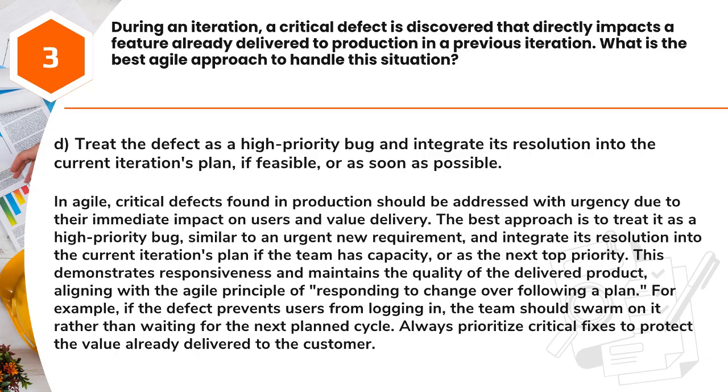This demonstrates responsiveness and maintains the quality of the delivered product, aligning with the Agile principle of responding to change over following a plan. For example, if the defect prevents users from logging in, the team should swarm on it rather than waiting for the next planned cycle. Always prioritize critical fixes to protect the value already delivered to the customer.